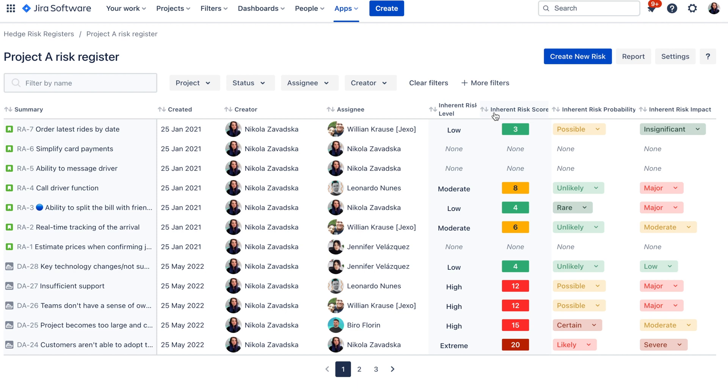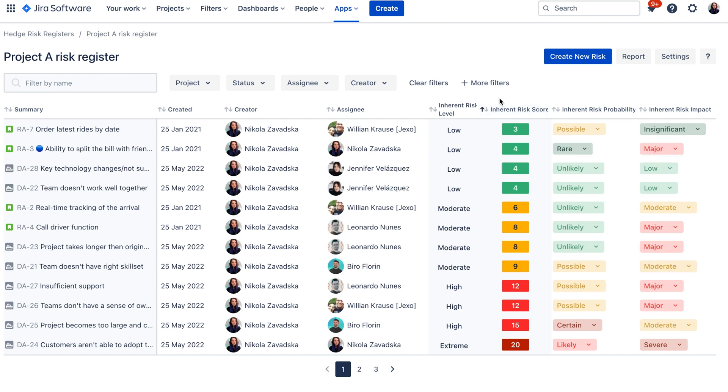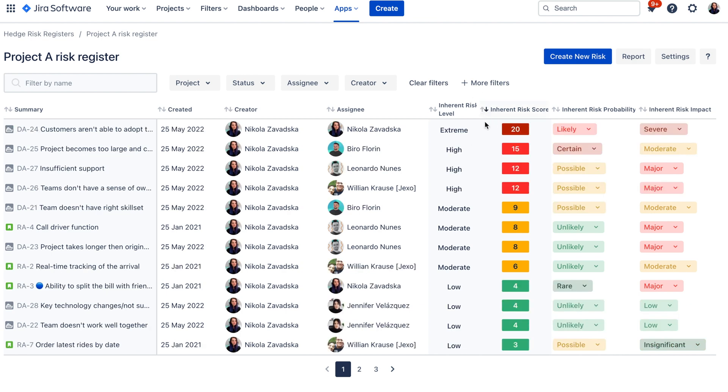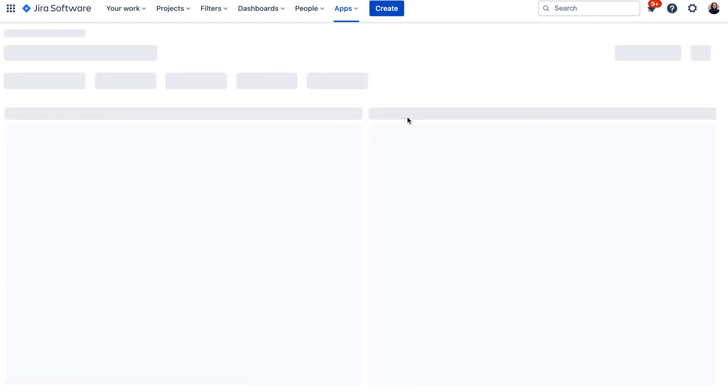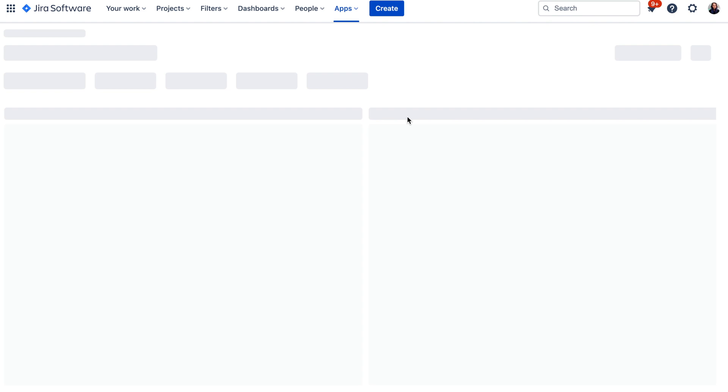So once you assign the scores to your risk register you can order your backlog of risks by the priority score from highest to lowest to see the most important risks on the top but there is also this report section which you can quickly access and it will show you the reports based on the metrics and risk score that you assessed.